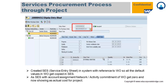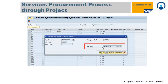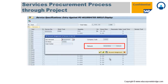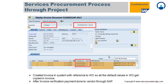The work order is a commitment, and once SES is done against the work order, the work order commitment goes to zero and actual cost flows into your project. The account assignment in the SES is the network activity, which is automatically copied from your work order. Once the SES is posted, you need to create an invoice against that particular procurement process or work order.